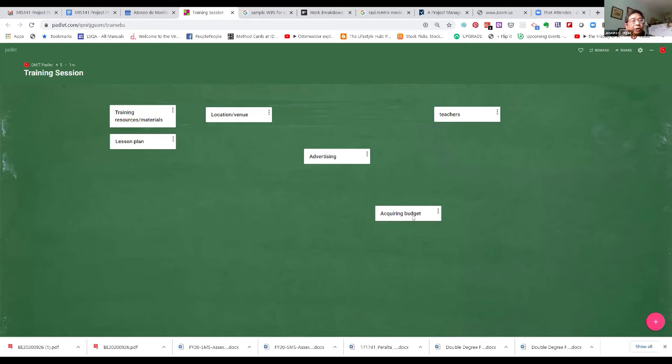The other school of thought or philosophy, which is the European method, is that you put down there the activities that you will be doing. So in other words, you will say here, instead of training resource materials, develop training resources materials. Look for location and venue. Develop advertising materials. Look for teachers. Acquire budget. So those are two separate philosophies. Please just use one. Okay? Just choose one of them. Although the lowest level here is the activities, and you'll see later on.